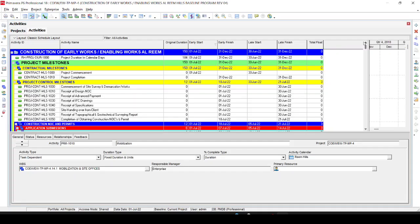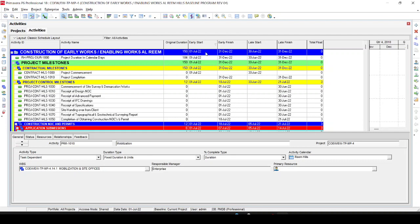I open the program to show you the problem. When you check, the early date is 1st July 2022, and when you see the late start, it is 30th June 2022. So early and late dates should be the same — let's discuss in detail why this is a problem.